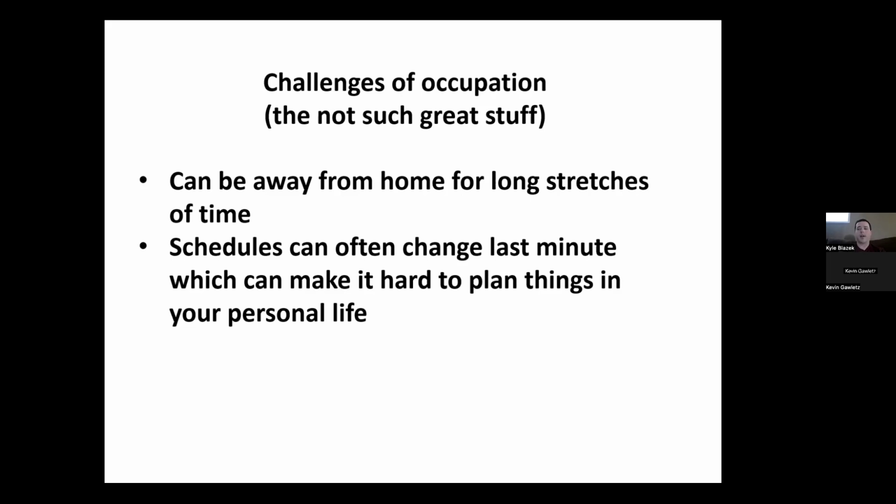Because say you hire on some subcontractors, some drillers, and they assume you're going to work from this time to this time. They likely have a different job booked immediately afterwards. And so you changing the schedule on your job kind of messes them up, or it could potentially mess them up for the next job that they have. And so you just kind of have to come to a compromise and what works best for everyone.